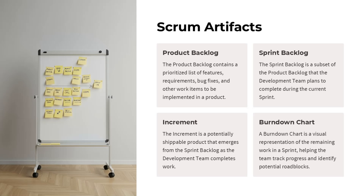The Scrum artifacts are the key elements that help organize and track the work in a Scrum project. The product backlog is the prioritized list of all features, requirements, bugs, and other work items to be implemented. The sprint backlog is a subset of the product backlog that the development team plans to complete during the current sprint. The increment is the potentially shippable product that emerges from the sprint backlog as the team completes their work. The burndown chart is a visual tool that tracks the remaining work in a sprint, helping the team monitor progress and identify roadblocks. These artifacts provide transparency and help the Scrum team plan, track, and deliver the product incrementally.